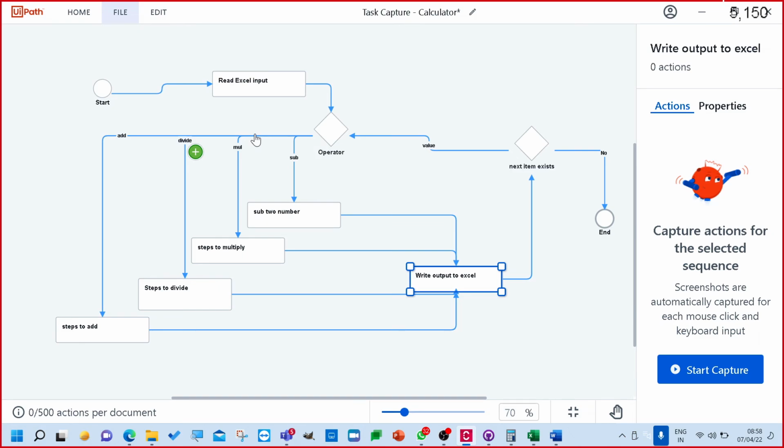If it is a very small project, that is 1 month, because in the first week we will do analysis, in the second and third weeks we will do the development, and in the fourth week we will do the testing and deploy the project. So in 30 days, a small project will be completed. If it is a medium project, then you can add 2 more weeks. If it is a very big project, then you can add up to 8 weeks. But if any project is taking more than 8 weeks, we will divide it into 2 submodules and make 2 separate, simpler projects.